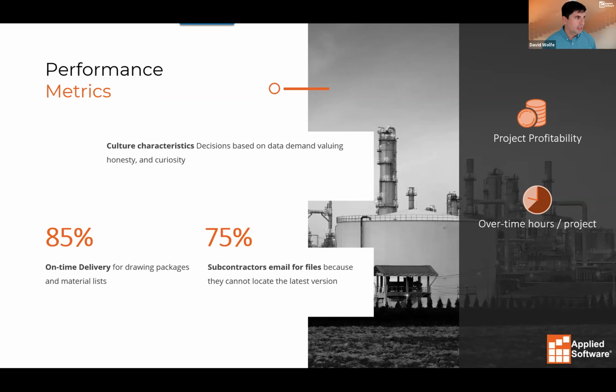Yeah, and it really does tie back. There is definitely the role that just needs to keep their head down and do work, but giving them the opportunity to take a breath and see the context gives them a lot more comfort with the value of the work they're creating. If you're able to tie it to the overall company goals and overall success, it helps them have more stickiness with your company. And there are even things like revisions. When we see a lot of revisions, generally that means conversations didn't happen early enough in the process, right? Because usually a new set of eyeballs got a hold of the drawings and had a bunch of markups.